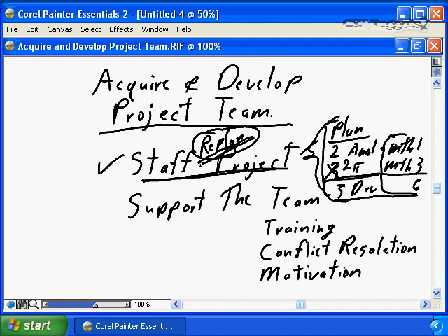Tell the business, tell senior management, hey, I understand there are other priorities. I understand this emergency project has been initiated. Therefore, my project is not going to be completed in month 8 because of the staffing shortfall, my project is now not going to be completed until month 10 or whatever the shortfall is going to be. Ensure that as you get staff for your project, you do the appropriate replanning to reforecast the project completion based on the actual staff that you're getting when it's time to staff up your project.